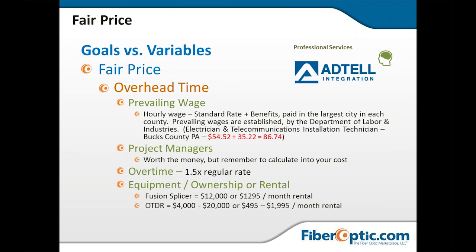Other overhead: project managers. Well worth the money, but you have to remember to calculate them into your cost. We have a lot of jobs where somebody needs to continue to interface with the customer, and when we're working sometimes 18-hour days to get out there and install fiber quickly, we don't always have time to communicate back. You need to make sure the project managers are there supporting you with tracking the hours for the technicians, tracking the supplies being used, other equipment that needs to be shipped up there, handling those logistics. All good things and all worth the money, but don't forget that those are costs of a job, not just the technicians in the field.